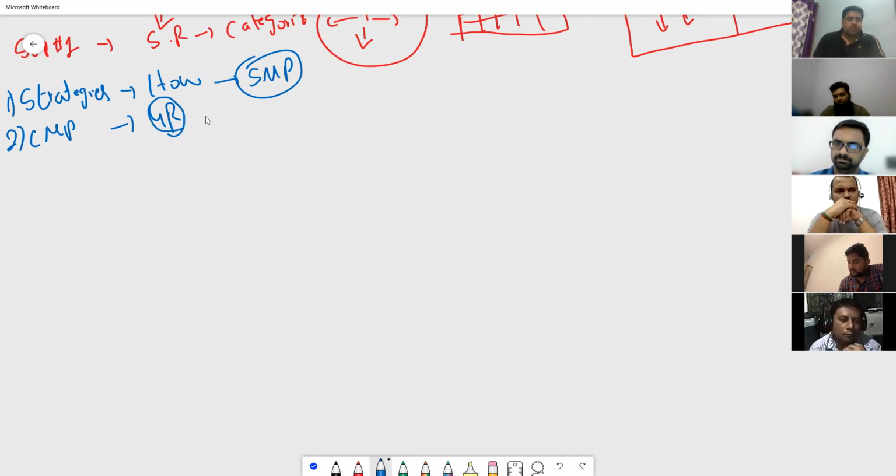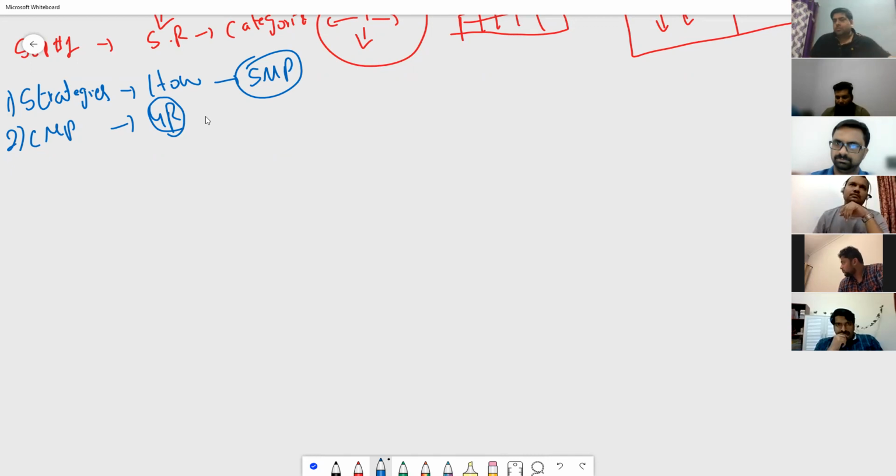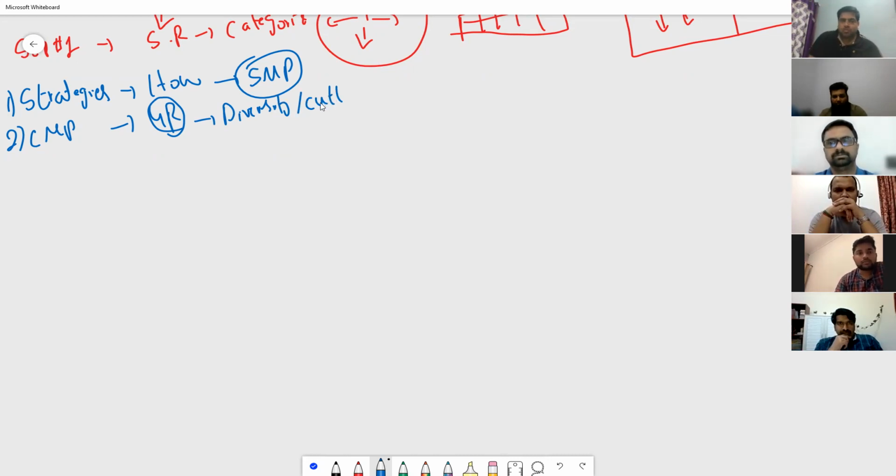In the communication plan, we also write who is authorized to share the information, how the information will be collected, how the information will be stored, and where it will be stored. Very important: understanding the diversity of the team you have, the stakeholders you have, their culture, their background. What learning format do they prefer? Do they prefer written format, or audio format? Do they prefer video, or formal communication? How do they prefer? Not you. This is very important. Not you.